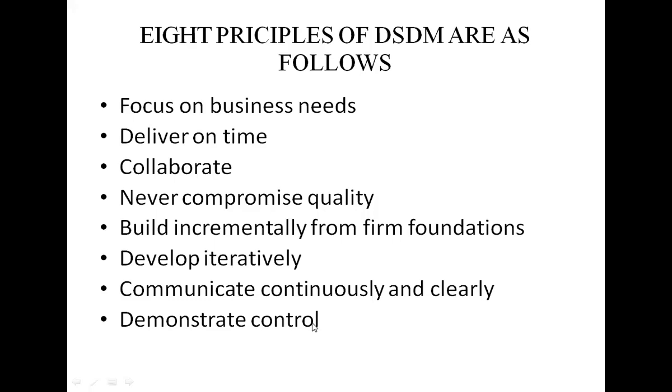For more predictable delivery, plan using time boxing: plan the deadline in advance and set a time frame for it. The features can vary depending on business priorities, but ensure that the delivery date remains the same.